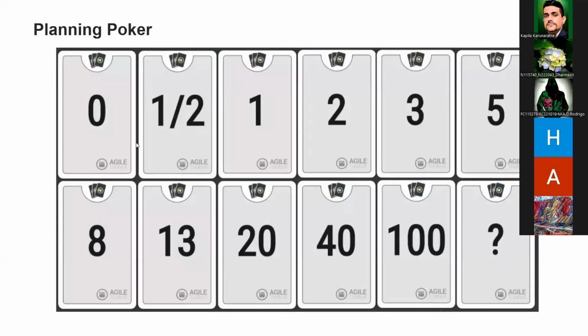If we decide to do the estimation, think of the wish list scenario I mentioned: if we have to create an add button, we need to estimate for the add button. We will ask each and every engineer to estimate on their own and keep it to themselves. Once everybody has completed the estimation, the Scrum Master will ask them to show their estimation. Then the team will take their poker cards and show them.